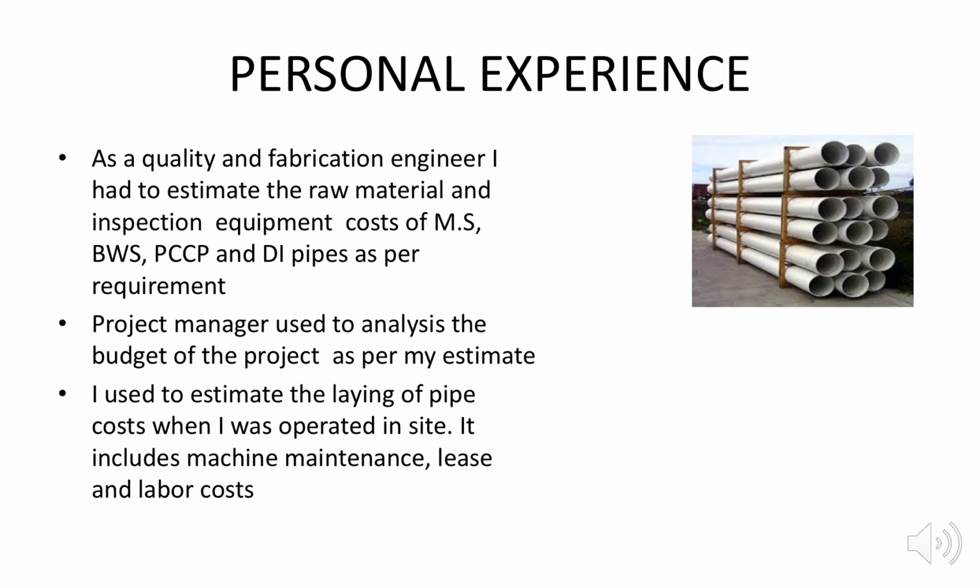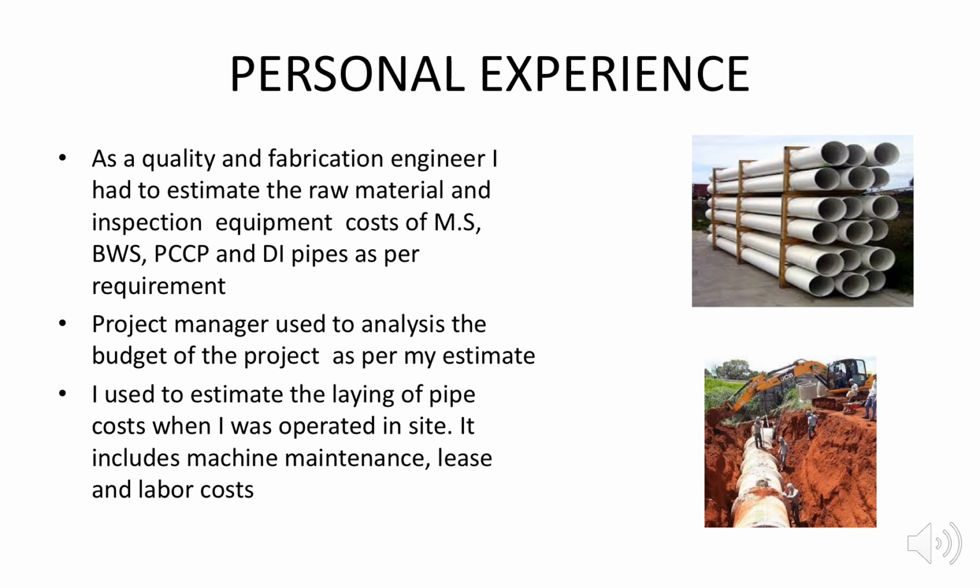The pipeline is commissioned into the soil, so we need to look at the laying cost, which includes machine maintenance, lease, and labor costs. These are all things we need to estimate. If we need to estimate the pipeline laying cost for 2 to 3 kilometers, it's a big deal to know how the machine maintenance, the lease, and the labor cost will be. So this is how a pipeline is commissioned into the soil, using JCBs and all that.